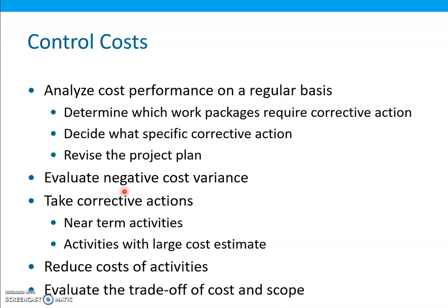So there are various ways to reduce the costs of activities. We can substitute less expensive materials, assign a person with greater expertise or more experience to perform or help with the activity, reduce the scope of requirements, and increase productivity through improved methods or technology.